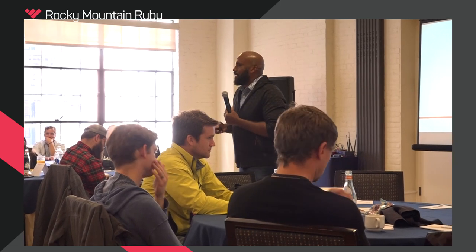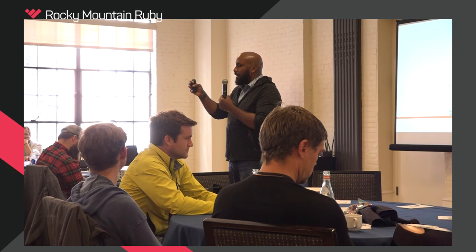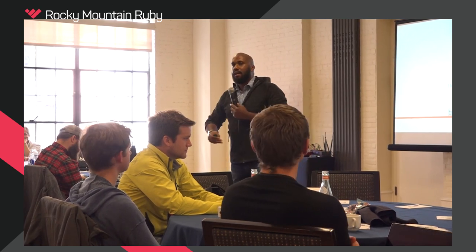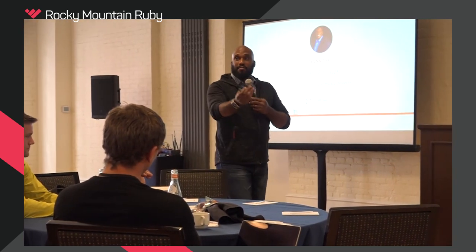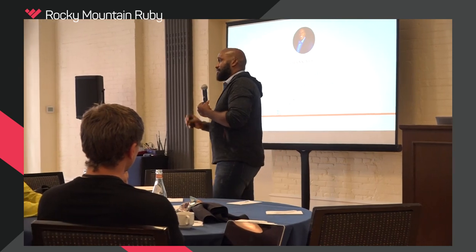And so in general, when I'm doing Scrum, I set up the sprints and make sure that the Scrum ceremonies are in place, that we do sprint planning, and that we take items off the backlog. We always involve the product owner in our sprint planning. So there are some things that I do, but I realize that life is very rarely perfect. In fact, it's never perfect.